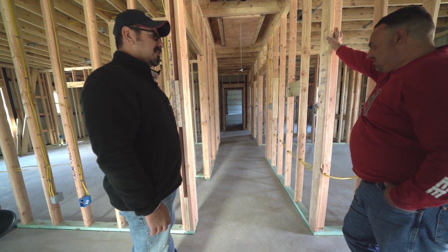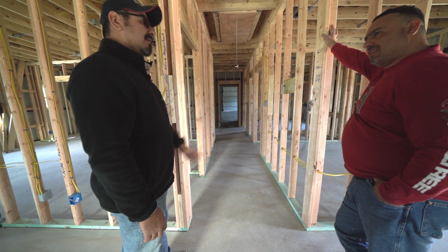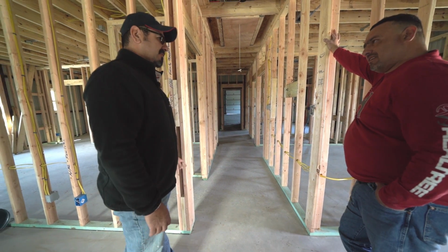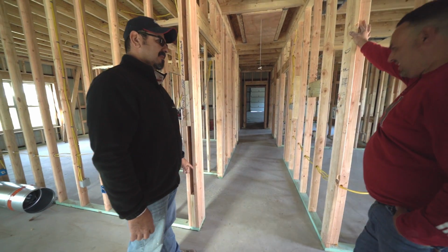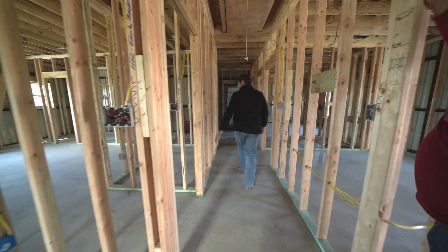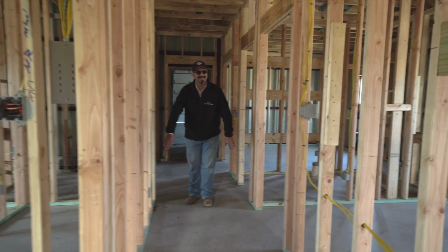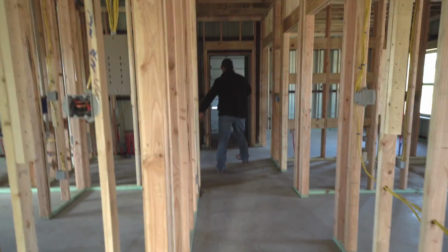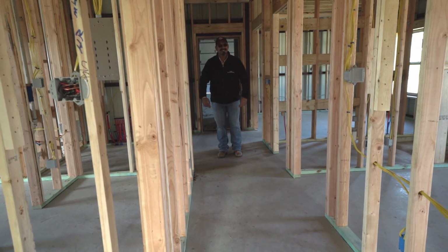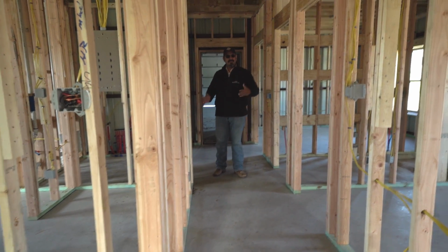So you do the math, and to do the entire hallway, $100 covers 39 square feet. Really? $100? Yeah. So if she gets $100 and starts from here, she's only going to get to about here, right? But if she goes the other way, she only gets to about here. So $100 is not enough to do hardly anything. You don't have a good stopping point.